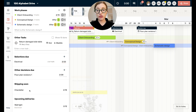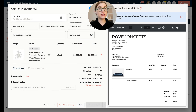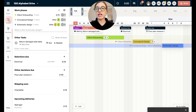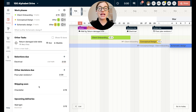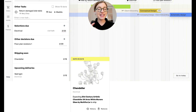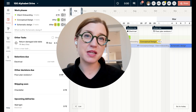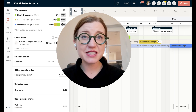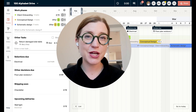From the selections workspace, if you click ordered and update it to shipped, you can put in the carrier information and schedule the arrival on your timeline, and it will show up as an expected delivery. An item labeled as shipping soon appears when you place the order with an estimated ship date, or when a vendor submits an estimated ship date. Once you've marked an item as shipped with an estimated delivery date, it moves to upcoming deliveries. You can hover and scroll to view the history or more information about any item. Thanks for spending a few minutes with me to learn about timeline and task management in Materio!